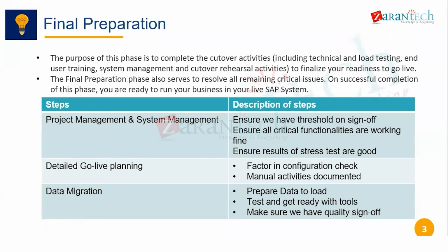Then the business might ask this question: how many checks do we have in a particular month? Is it the prevalent method of payment? Then the business will tell, for example, if their volume is low, maybe I have a maximum of 10 check payments in a month. So that is considered a low volume. Then they can still go ahead with the go live, but this will be kept as an open point. Right? So this is for the project manager.